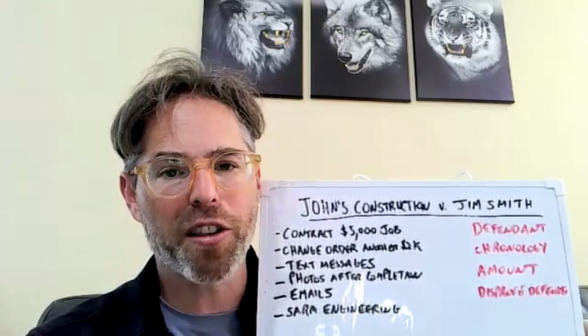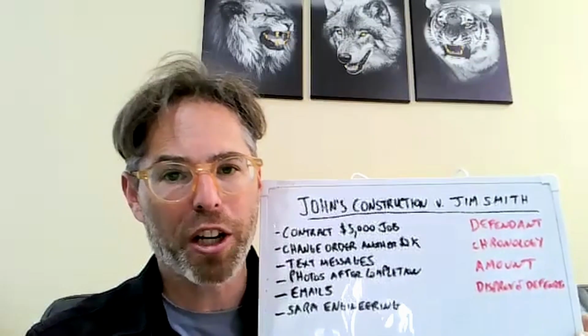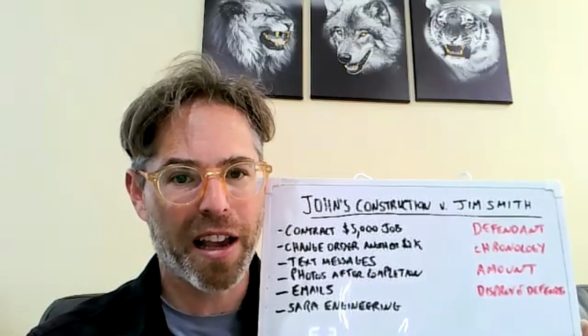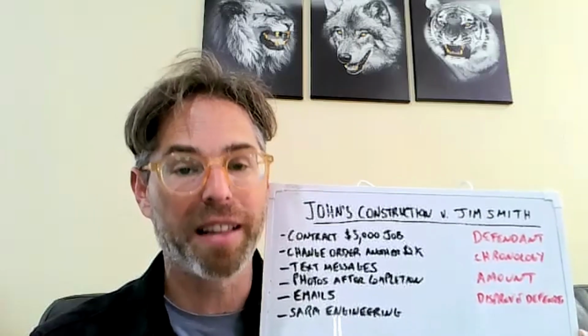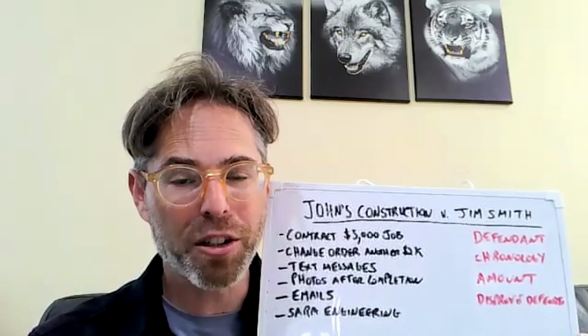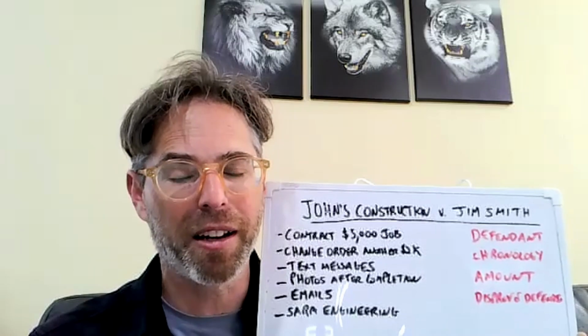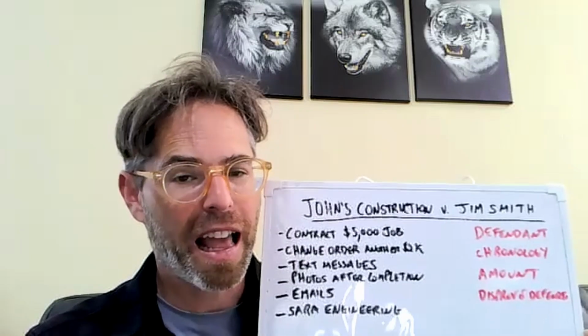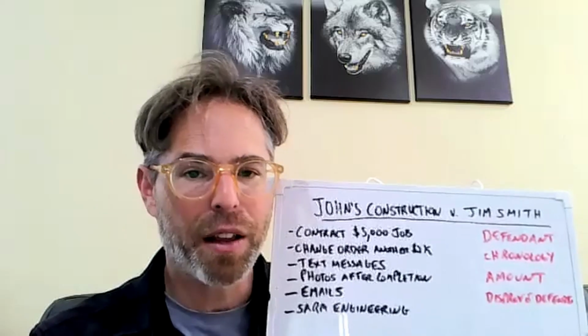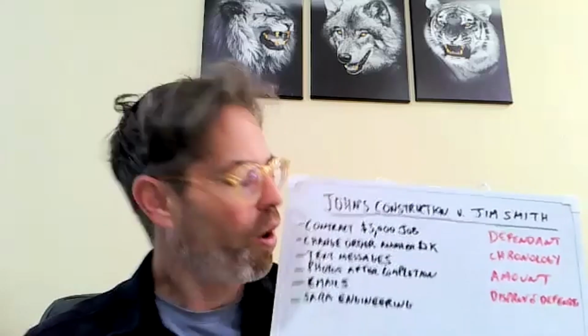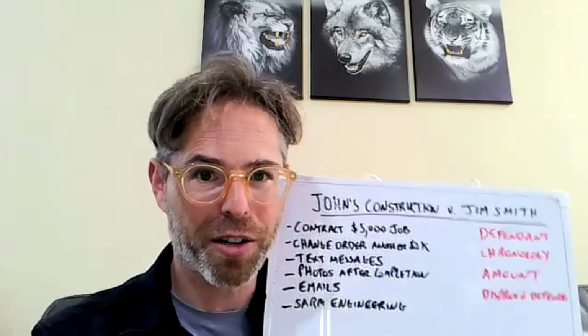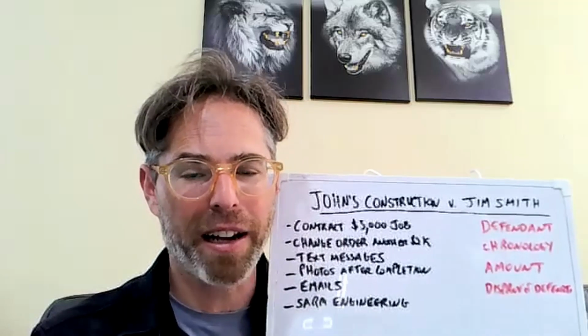Now, it's interesting to note that really what should happen in such an instance is that the two parties enter into a revised contract or an addendum, sort of like a supplemental contract to the first contract, to make it clear that there's been a change order. And let's say that they didn't. Okay, so let's say that all this was done via text message. Again, different laws will apply in different jurisdictions.